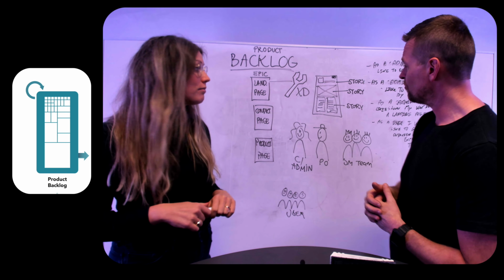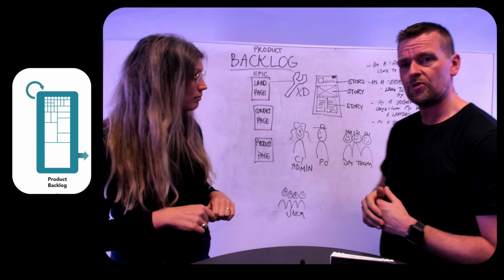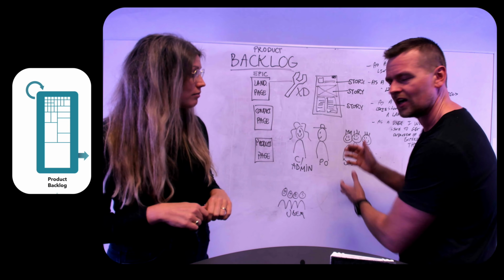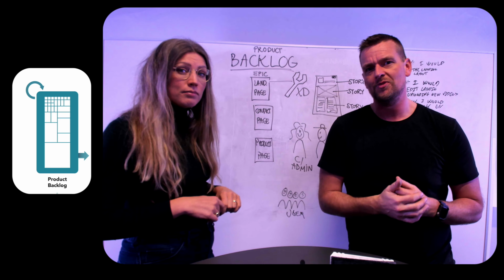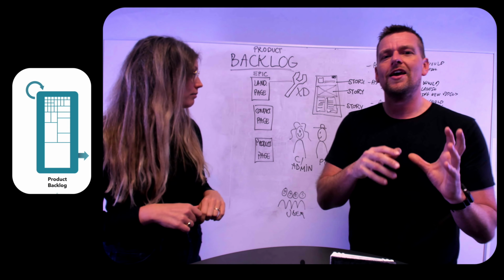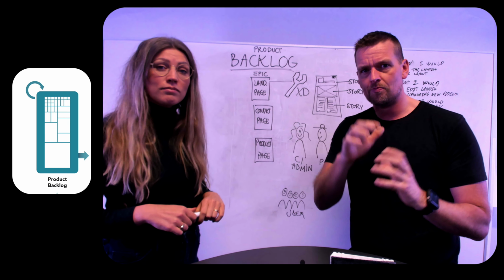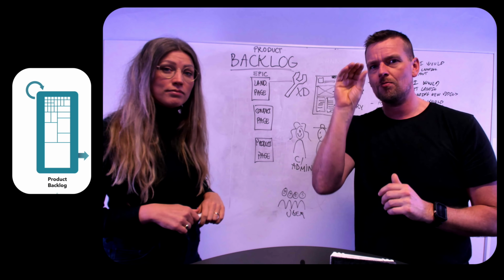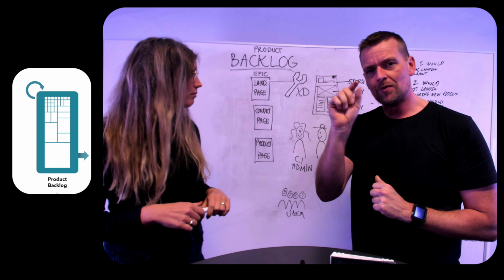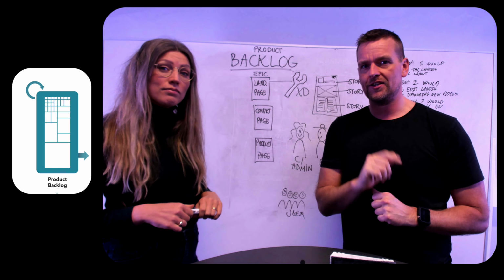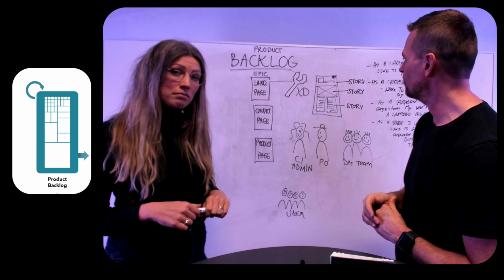There's so many things you could actually choose on a landing page, right? So again, we're going to try again, the product owner with the customer, and maybe now we're going to also pull in a couple of developers to talk to the customer as well. And then we're going to try and add user stories instead. So break down this epic story into multiple user stories that we can then break even further down later on as tasks. But let's start with the user stories.